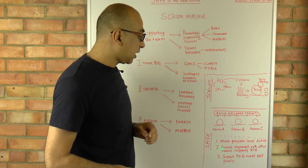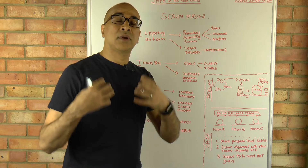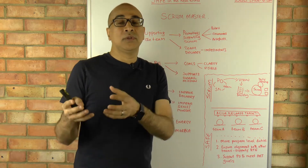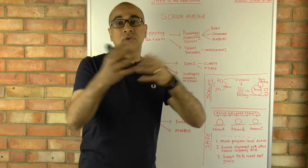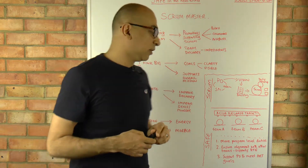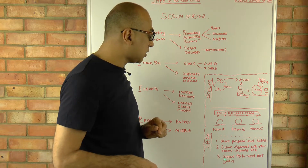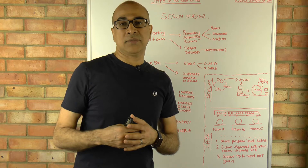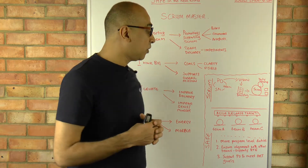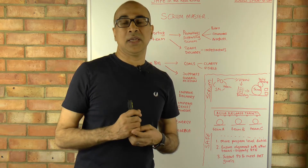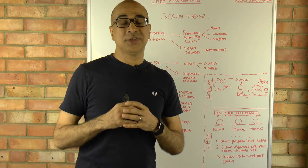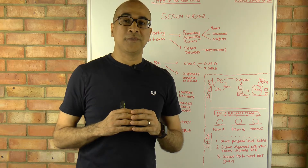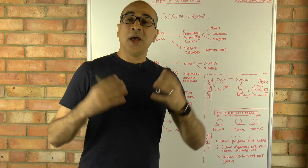The Scrum Master in SAFe also needs to ensure greater alignment by working with the Release Train Engineer and other teams. For example, if you're building a component that depends on a story from another team, you may need to coordinate with that team's Scrum Master to get the deliverable at the right time. Finally, the Scrum Master supports the product owner in making sure the ART goals are met. The focus in SAFe is not just on the individual team but on supporting the overall Agile Release Train — a slightly more holistic, wider view.